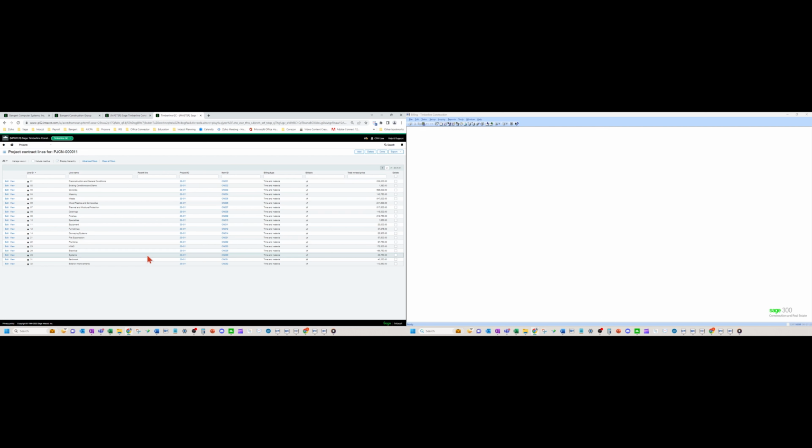So the purpose of that is if you have a time and material billing that is more of an AIA or progress style form that needs to come out of the system, this setup that Intacct has put in place with the summarization checkbox allows that. Sage 300 does not have that at all. Okay, so that is not even possible in Sage 300.